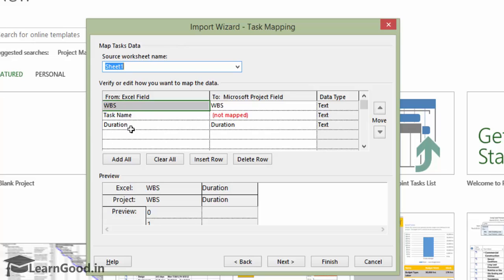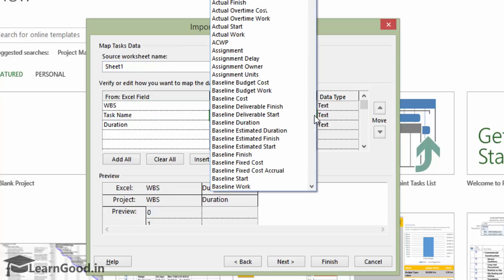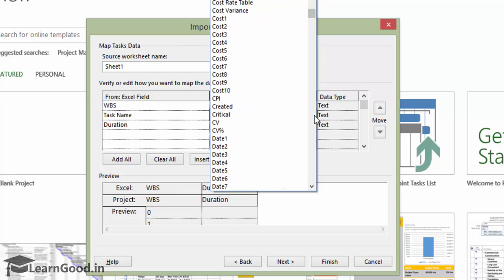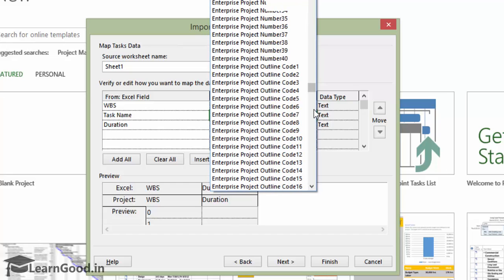You can see the Excel fields, WBS and duration are identified correctly, but the task name header has a not map in the red letters. What this means is that we have to manually identify which column in project this goes to. This is easily done as project has a column called Name.